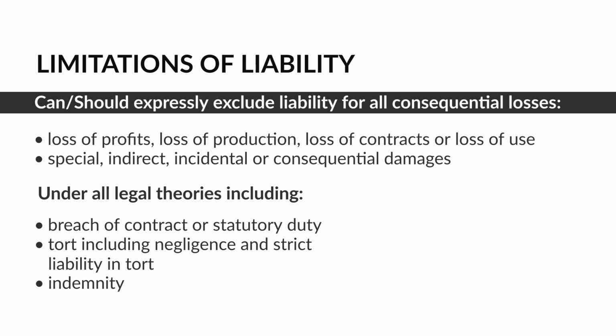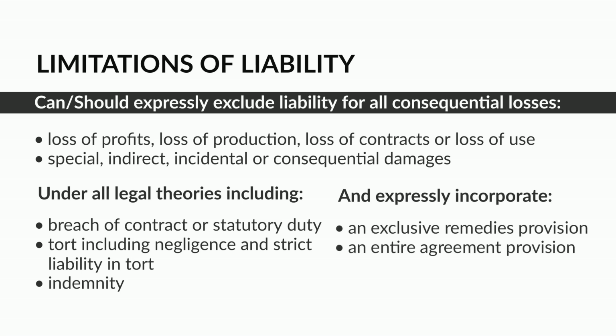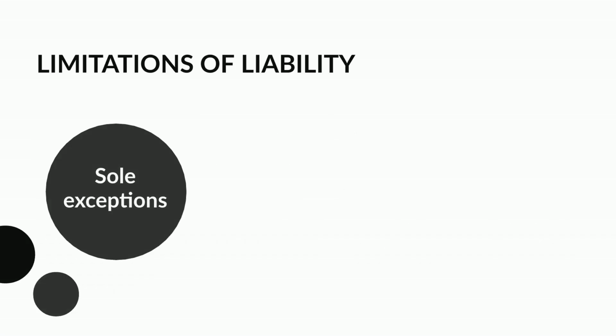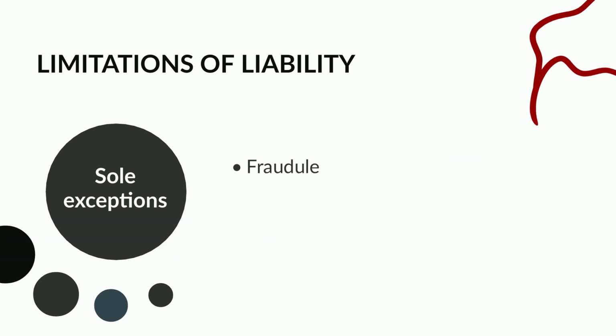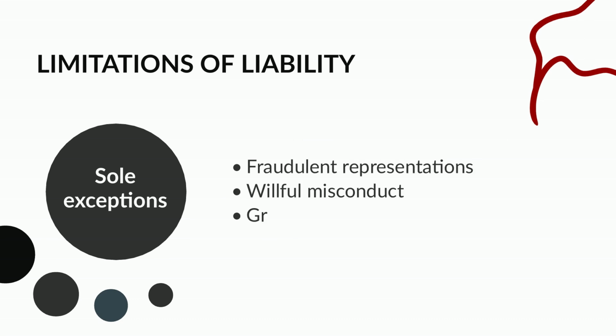Indemnity. And expressly incorporate an exclusive remedies provision, an entire agreement provision. Sole exceptions: fraudulent representations, willful misconduct, gross negligence.